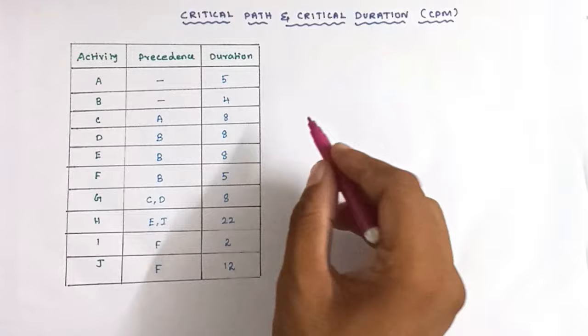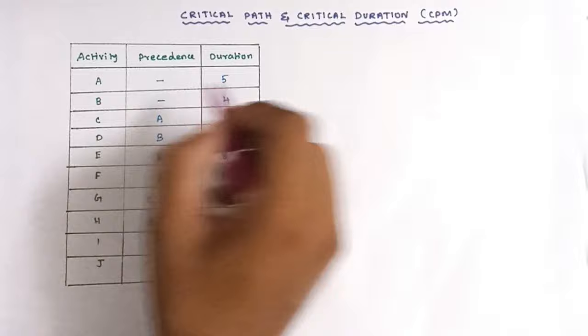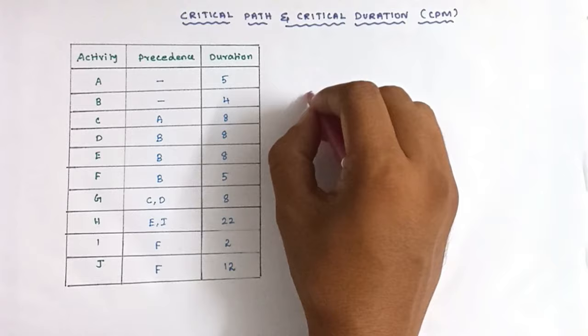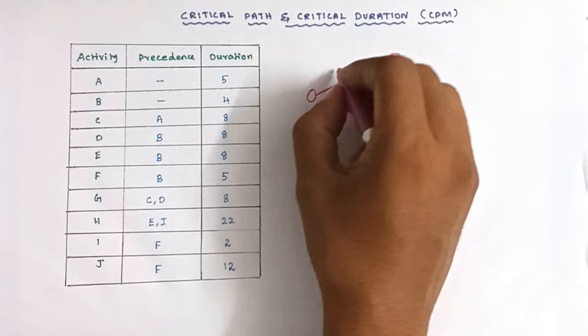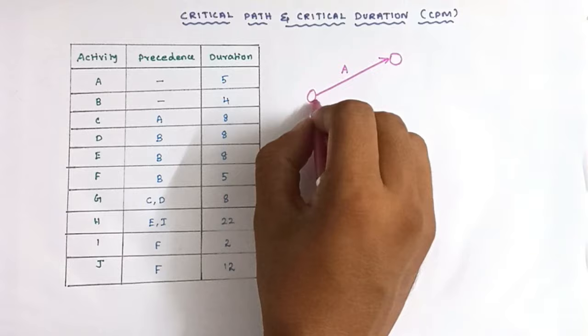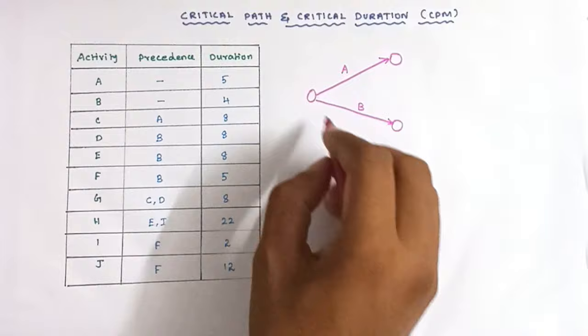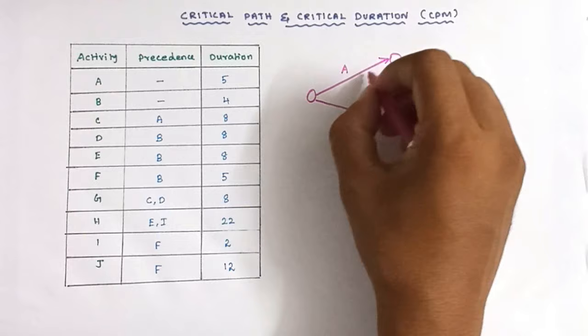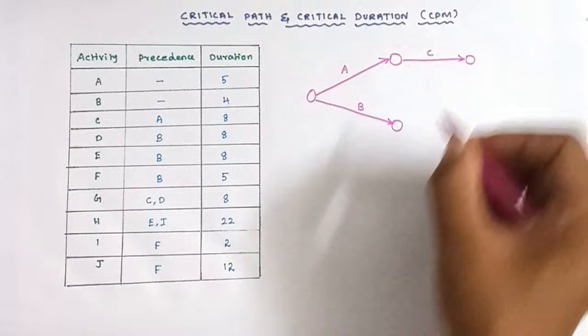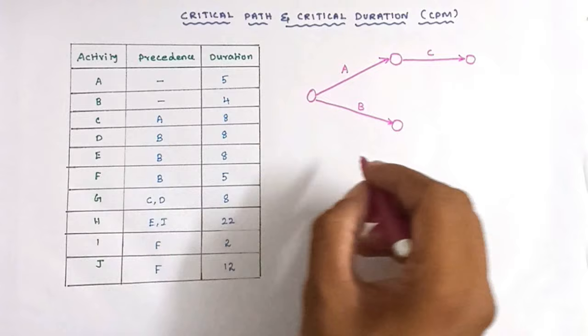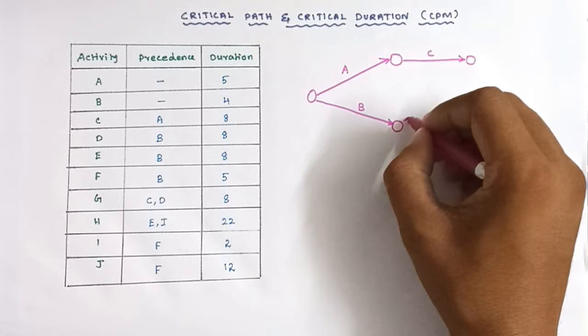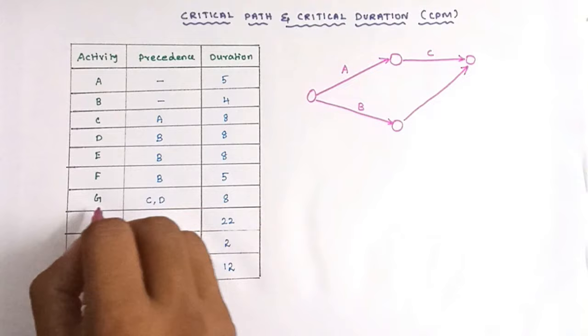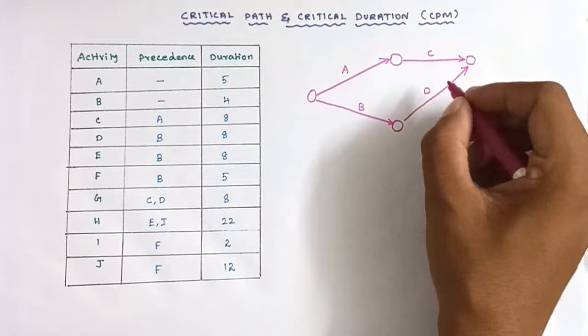For A and B there is no precedent relationship, so we can draw A and B first. Activity A has no precedent activity. Activity B also has no precedent activity. Next we draw C — after completion of A, activity C will start. Activity D will start after the completion of B. We can draw D here because C and D are in the precedence relationship for G.